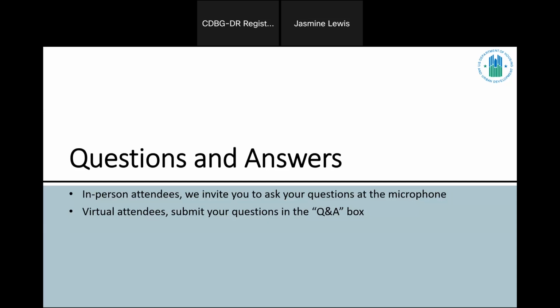So that is something where you can conduct one of those lower level reviews to get them underway. And that would allow you to spend costs for those planning services under that level of review, rather than waiting for the overall review, if you're looking at an environmental assessment to be completed.